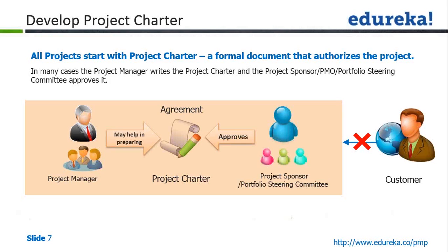So this charter is an agreement between the senior management and the project team, and the project sponsor is an interface between these two entities. Okay. The project sponsor may or may not take help of the project manager in developing the charter, but it will always and always be signed off and approved by the project sponsor. It can be the project sponsor, or it can be a portfolio steering committee also. Okay, so that is the purpose of it.